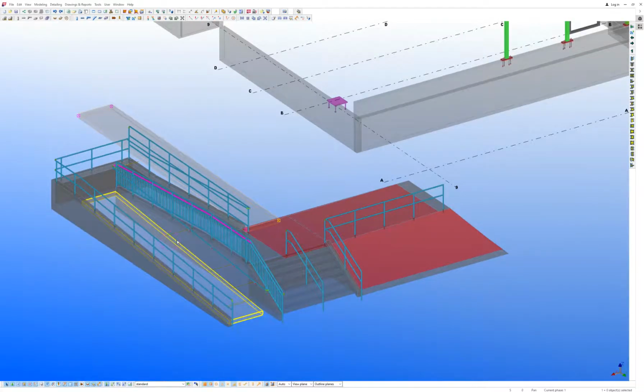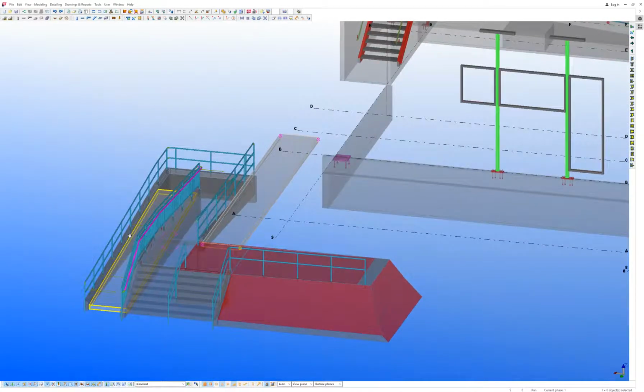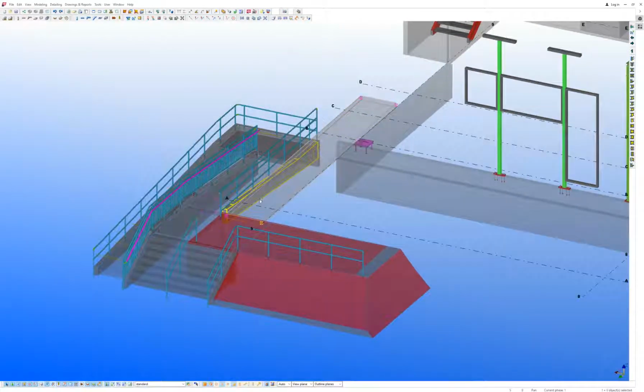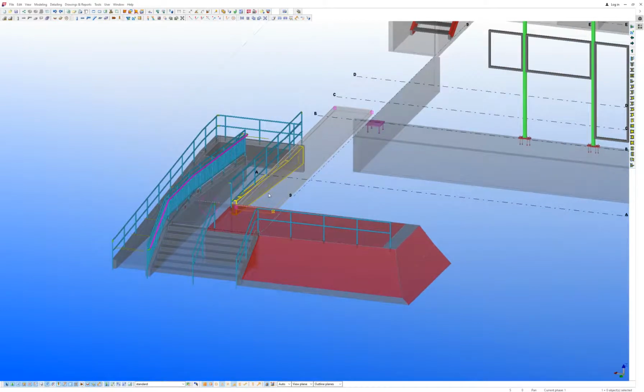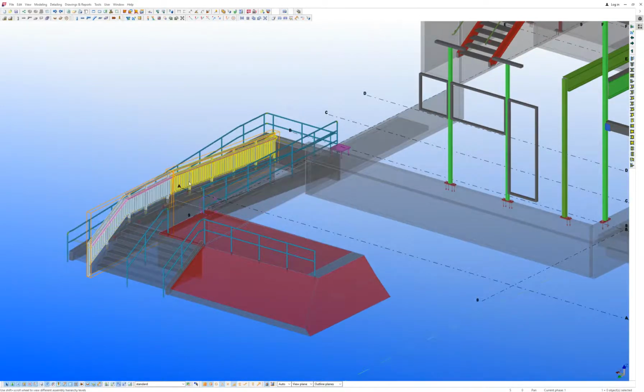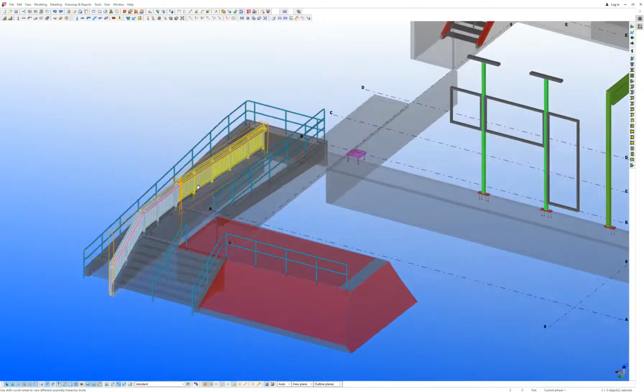It had some external stairs, concrete shapes, different things that needed to be measured. The general contractor in this case was responsible for taking the measurements. The general contractor measured it incorrectly, and this rather involved set of center handrails all had to be refabricated because the fabricator followed the directions provided.